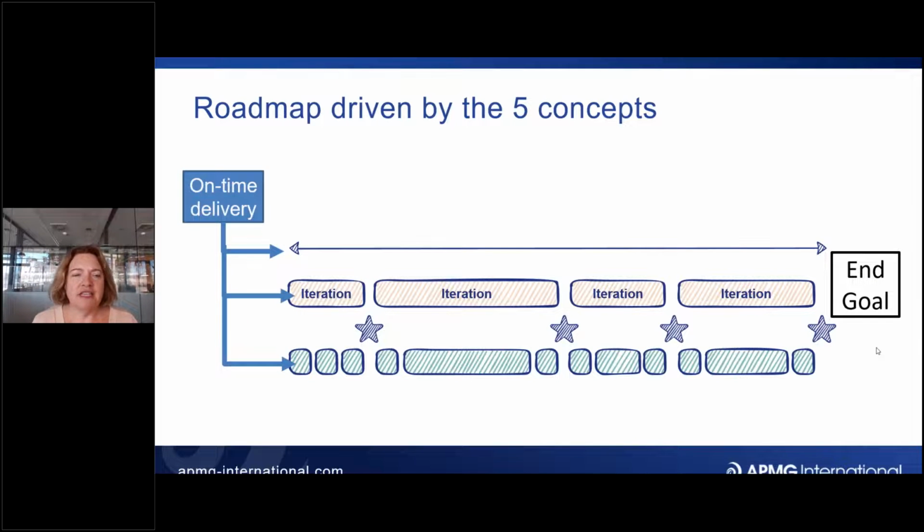And the first of those is that we stick with on-time delivery. Now, that might be a strange one to pick, but effectively what we're saying is, we're going to deliver you a capability, an ability to do something on this date. So get ready for it. That's the point at which we'll start to realise benefits. You need to be prepared to operate in that way from that date. But exactly what all the deliverables are in there, exactly how that will work, well, we'll get to that. We'll plan that as we go.